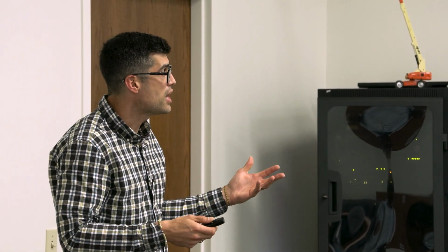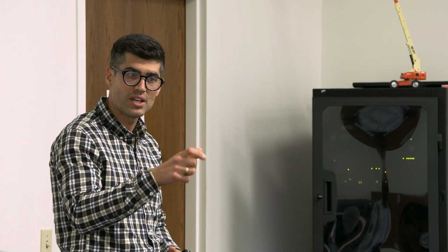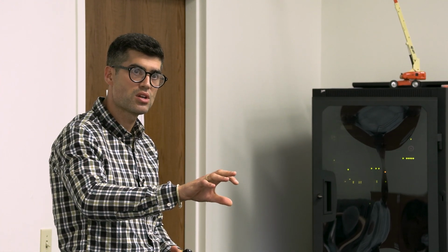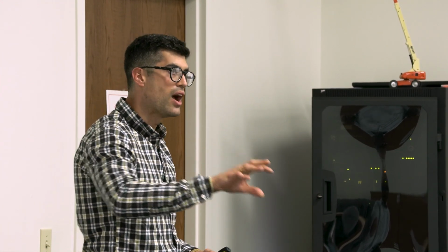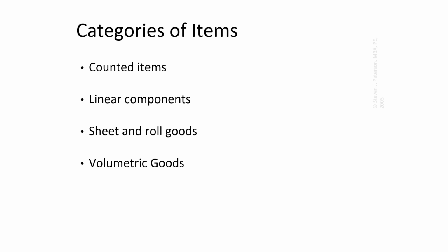We can break it down by location, installation schedule. You can look at work packages differently from how you assign them to subcontractors. They're unique, but I also need to be able to extract data really fast for meeting sake too. We break it out a couple ways. Counted items, right? So again, I will spot check these types of things. Examples of counted items: lighting trays, diffusers, scutcheon plates.